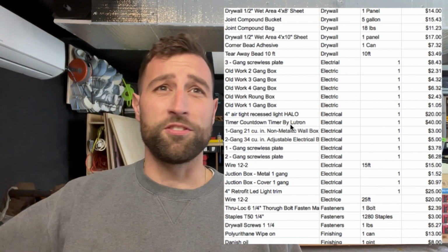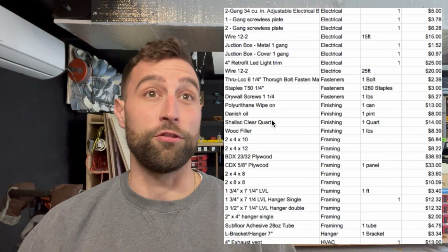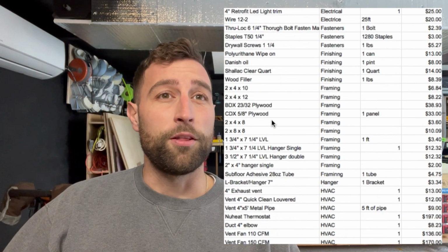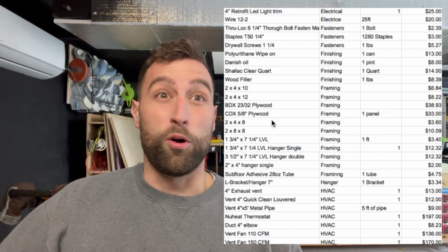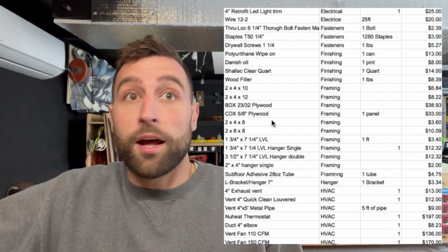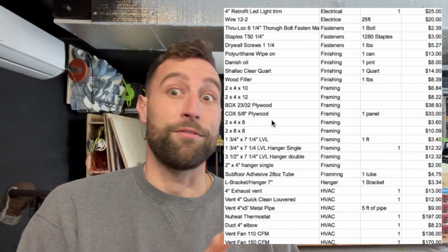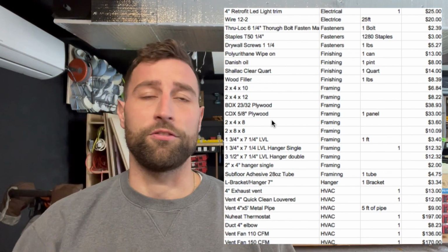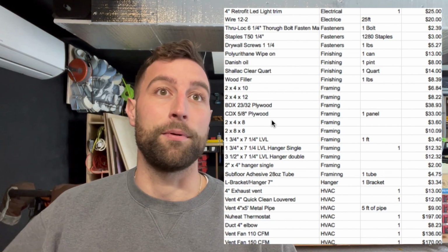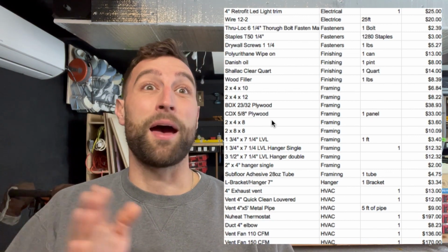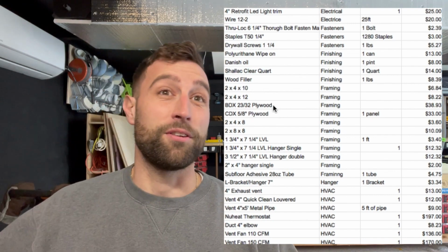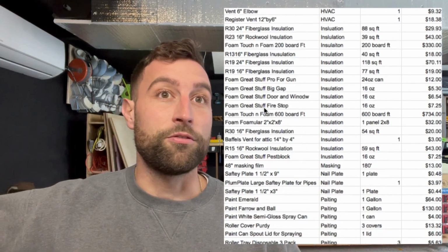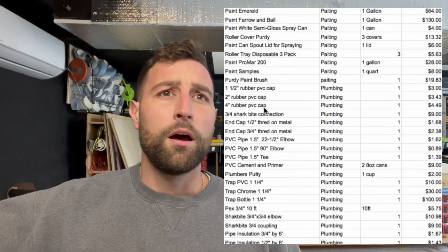I'm not an electrician, but sometimes I'd buy the boxes for the electrician so I could put them in the correct location. So that's why those are on there. Or the electrician's just a little disorganized maybe, and you want to make sure that everything's there, and a box is usually less than $50, so sometimes it's worth having the right thing on the job and not delaying a timeline, because on bathroom renovations, timeline is everything. If the electrician can finish a job in a day, it's way better than 2 days if they have to run and buy a box.